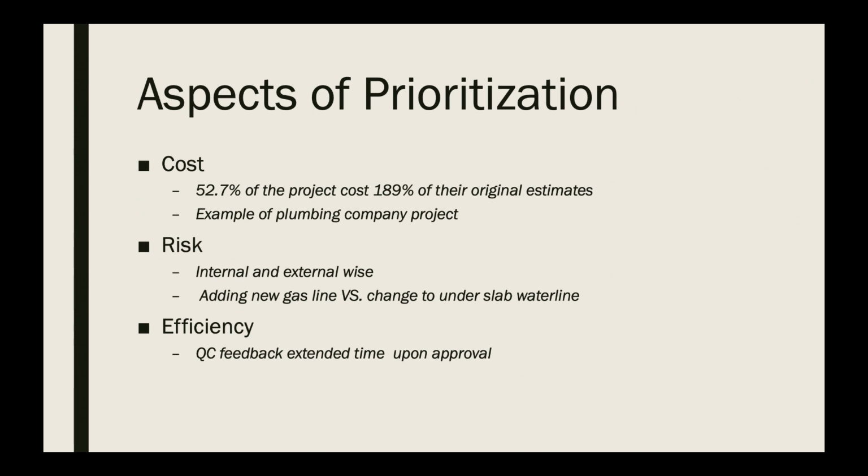Thus, developers will work a longer time and the schedule got pushed back for rewriting the old code. Also, more workers are hired and more equipment such as computers and iPads are bought to serve the team better. And these are example factors that need to be considered before making new requirements to identify if the requirement is worth spending that extra money.